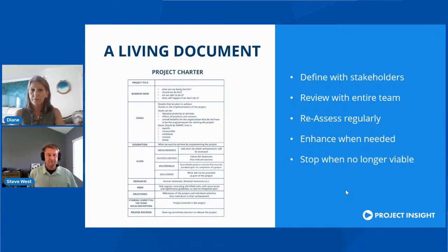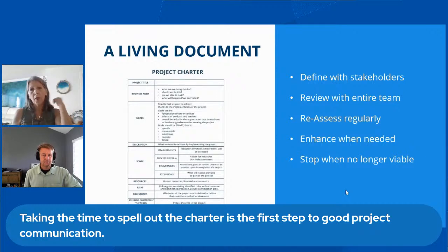The little sample here is basically a one pager. And a lot of times companies use their own statement of work or change requests as that charter. It's at least a place to document what was the expected outcome, what's the client wanting out of this, and what are some of the steps that we're going to do to deliver it, and maybe some risk and maybe some resources. But at the very minimum, it's authorizing that the project is viable and you should put energy and resources toward it.